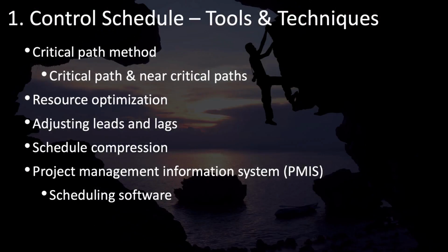Other tools and techniques include the critical path method, which you can use to keep an eye on the critical path, as well as near critical paths that present risk, resource optimization, adjusting leads and lags on activities, schedule compression techniques, and your project management information systems scheduling software.